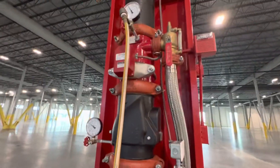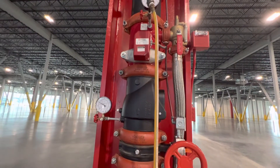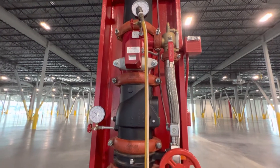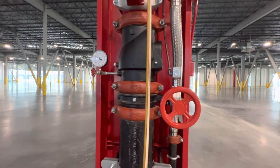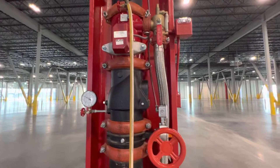It's up to 150 PSI. In another 20 minutes it should be at 200. And then we'll wait for two hours. Hopefully it doesn't leak, and then the system will be tested and complete. We'll sign it off and have it witnessed by the superintendent.